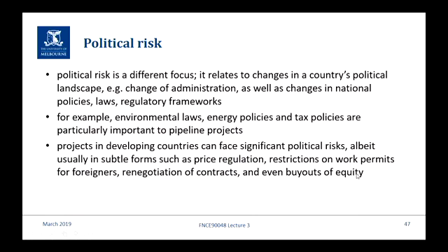So if you go into other countries, you can face significant political risks. And it's usually in more subtle forms than straight out expropriation. They might just regulate prices. Okay, if you open a toll road here, there's an example I think on the next slide, you can't charge what you need to charge to make an appropriate return. We're going to put a cap on what you can charge. Restricting work permits for foreigners. The Iranians always played this game. Every time our expats went out, they took a long time to renew their visas.